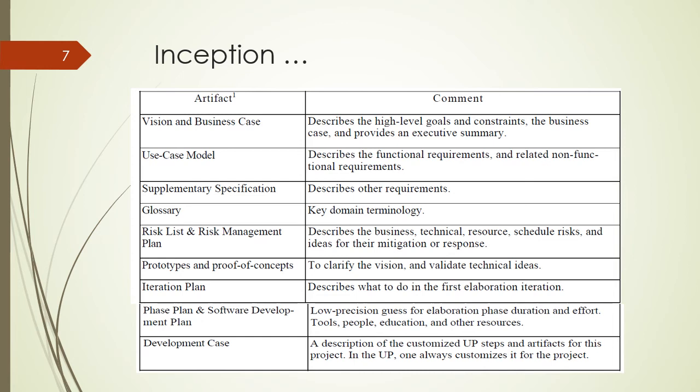Phase plan and software development plan, low precision guesses for elaboration plan, duration and effort. Tools, people, education and other resources. A development case, a description of the customized unified process steps and the artifacts for this project. In unified process, one always customizes it for the project. Now, all these artifacts, it is not necessary. These are the artifacts given for the inception phase, but it is not necessary that you use all the artifacts or maintain all these artifacts.